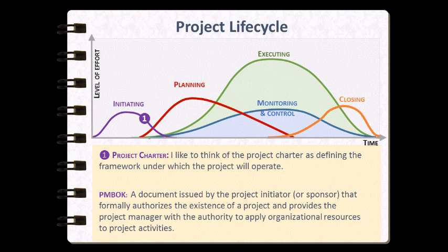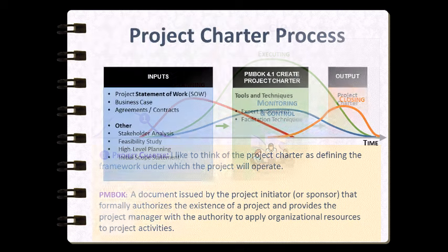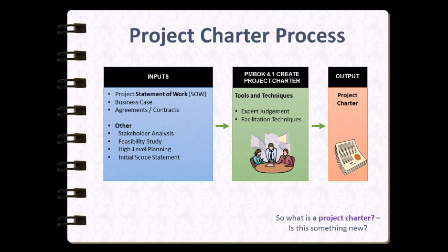Once the project charter has been accepted, the project manager will agree to take on the project and the actual planning can begin. As the project charter is created early on in the project's lifecycle, there is often not a lot of documentation available to draw upon to produce the charter. I have always found that the primary contributors to the project charter would be the statement of work, the business case, and any pre-existing agreements or contracts that have to be abided by.